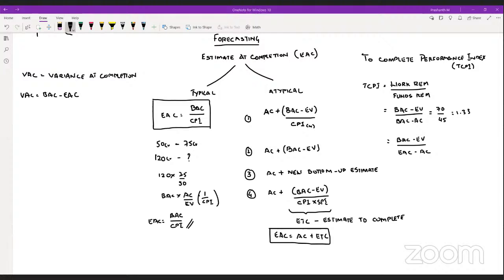Jasmith, did you vote? Yes, I just now voted. Okay. Now, you have answered that the project is completed and at the time of completion, it's behind schedule and under budget. Behind schedule, under budget is correct, as we can directly see, SPI is 0.8 and CPI is 1.1. But the same option you can also find in B: project terminated at the time of completion, project is behind schedule and under budget. Actually, B is the correct answer, no?